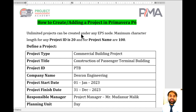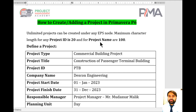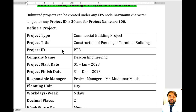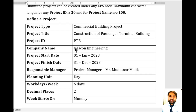In this video we will discuss how to add a new project in Primavera P6. Unlimited projects can be created under any EPS node. The maximum character length for any project ID is 20, and for project name is 100. Whenever you want to create a new project file, you require certain information before starting.